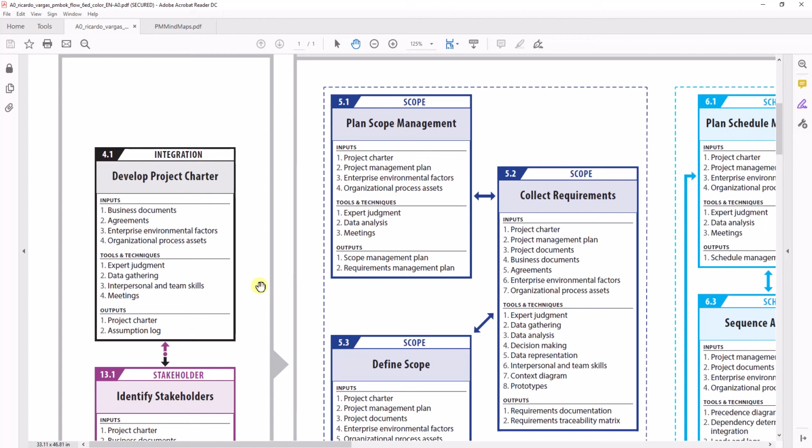As you know, the project sponsor is accountable for making the project charter. He or she may actually engage the help of the potential, probable future project manager to write it. So responsibility may lie with the project manager. Still, the project manager will be writing this charter, but at the end of the day, the sponsor is accountable for ensuring the project charter comes into existence.